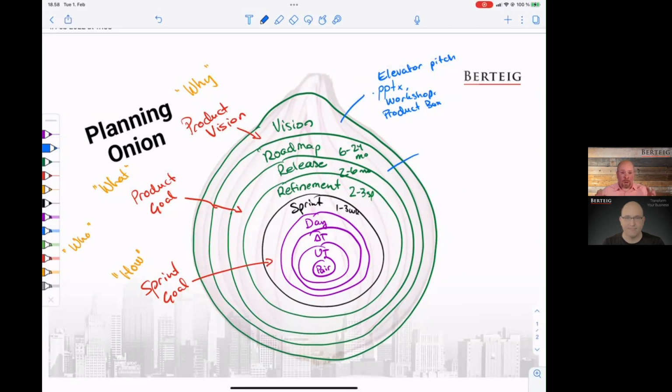Because when we talk about roadmap, what we do need to communicate is what are the major pieces that we think we need to move, that are moving, and how are they connected to each other, and the general timelines, and possibly other programs or projects. So sometimes a Gantt chart does a very good job, as long as it's not the kind of Gantt chart we're used to building in project management, which is small tasks and interconnected waterfalls, but just that we want to visualize what are the major parts, major initiatives, how they are possibly connected.